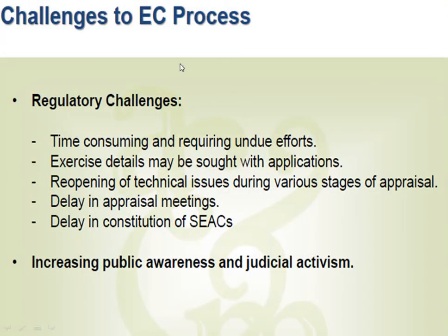And challenges for the EC process, the environmental clearance process. It is time consuming, naturally. Excess details are sought with the applications. Technical issues are reopened at various stages. Some other problems may come, which again need appraisals. Delay in appraisal meetings. Delay in constitution of SEAC, the State Expert Appraisal Committees, and increasing public awareness and judicial activities. So these are the different problems we face.